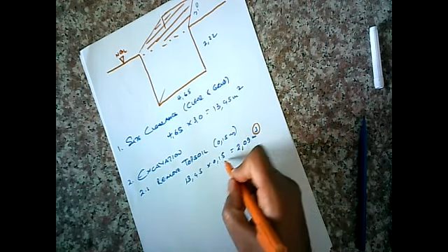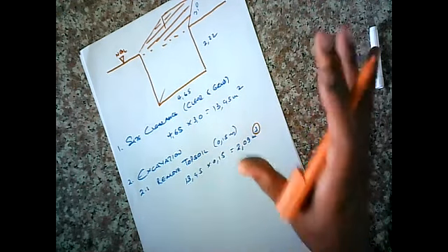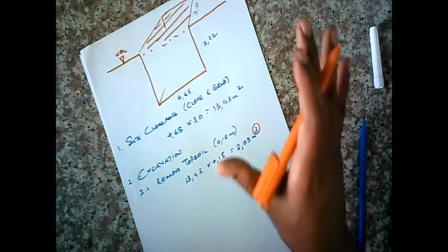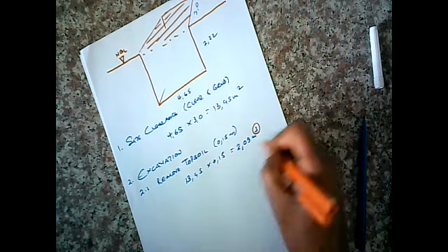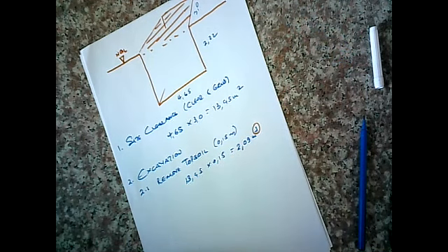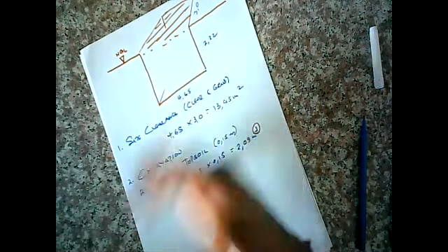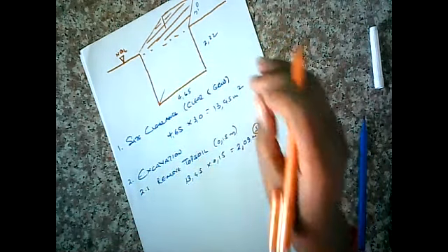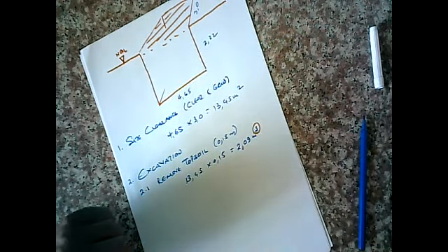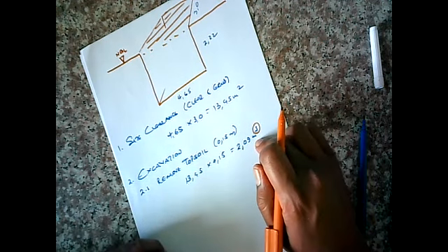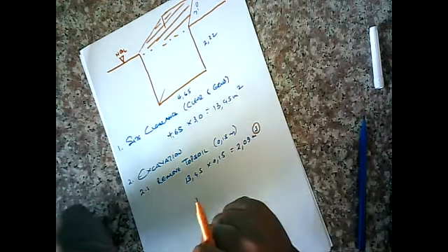And because of the large area and that depth, the amount of material generated from topsoil removal is going to be substantial. Because it's going to be substantial, you can't use it. You have to discard it. You have to get rid of it. That does not come cheap. And when we know volume, then we can actually put a price to it.